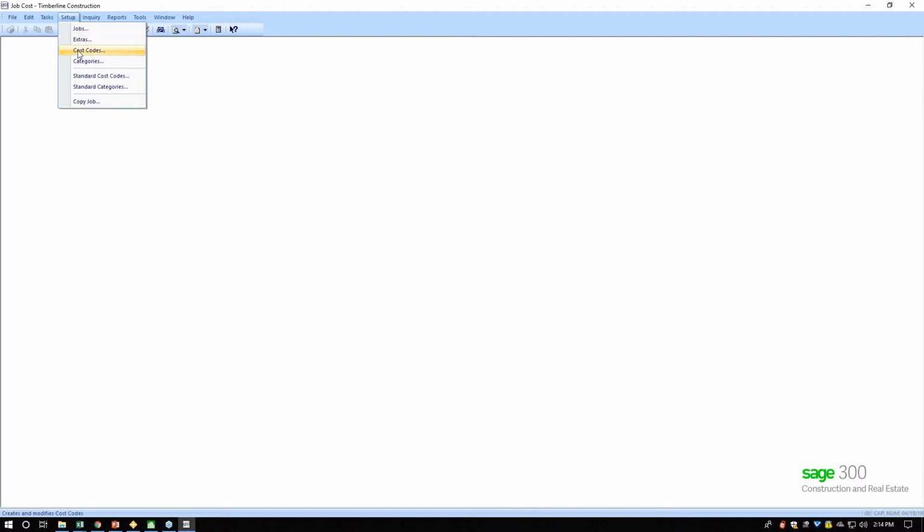And below that, or maybe below the job, are cost codes, ways to break a project into pieces. In this case, most often, these pieces follow Construction Specifications Institute ways of organizing costs. Cost codes don't have to have categories in Sage, but most people have categories.